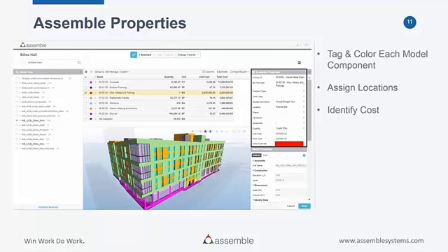space. And then finally, we can even transfer the data back from the estimate to Assemble and list the cost of every scope as a kind of reminder of how much each bid package may cost and what the unit rates might be. So just a lot of flexibility, a lot of data that can move back and forth between the 2 software, and a tremendously useful tool for communication purposes.